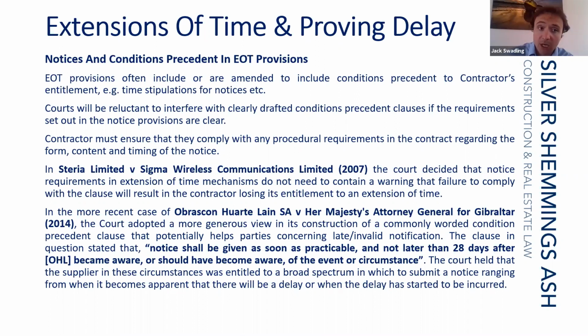As mentioned, extension of time provisions and conditions precedent are often brought in under schedules of amendments. And when I say a condition precedent, I mean generally a notice provision which is a requirement for the contractor to establish any entitlement at all.